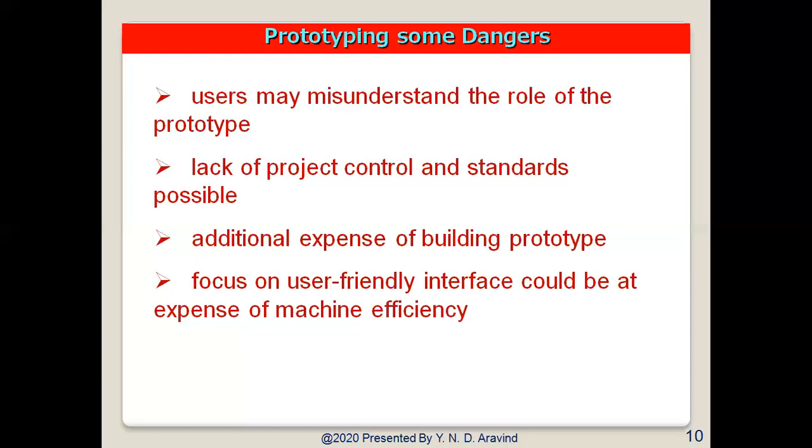Where we cannot use these prototype models: we cannot use these in web-enabled e-business systems, where the project team composition is unstable, where the future scalability of the design is critical, where project objectives are not clear, or where project risk regarding the requirements definition is low. In such kinds of situations, we cannot go for a prototyping model.